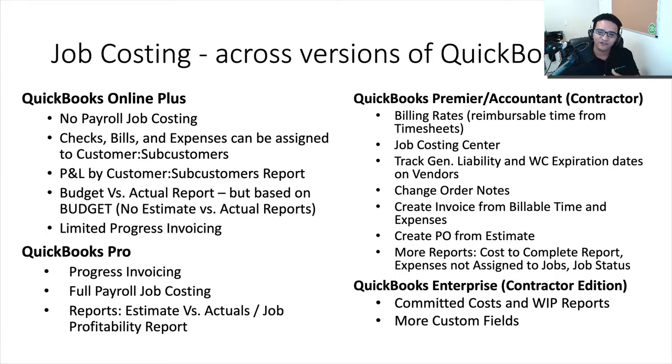As of the date of this webinar, I still do not recommend QuickBooks Online for job costing, specifically because you cannot do payroll job costing. Also because progress invoicing, which we're going to cover today, is very limited, and there isn't a budget versus actual report, an estimate versus actual report, which is the most important thing that we need to have in order to have some sort of work in progress report.